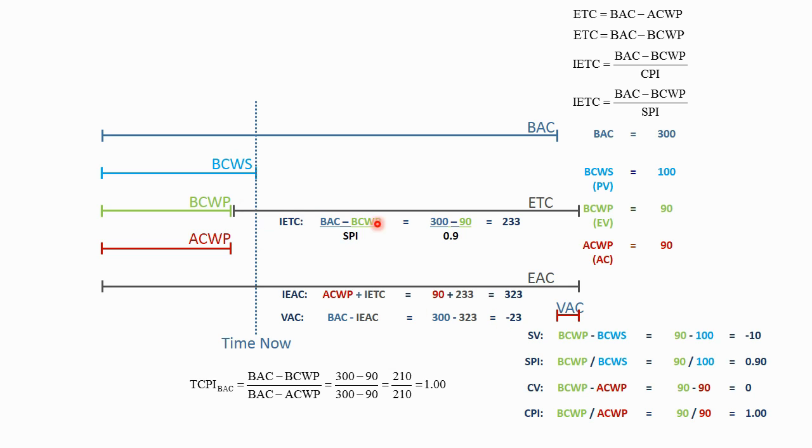So in order to get back on schedule, we have to increase this budget. It means we're going to overrun by 23 hours. And maybe that's okay. Maybe schedule is the most important thing to us. Maybe we have 23 hours to spend.